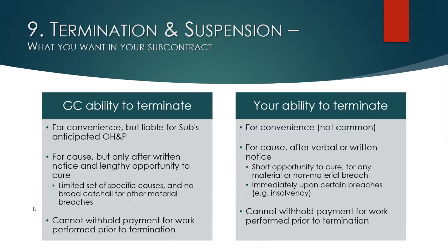Your ability to terminate for cause. If the GC or someone else is causing you detriment on the project, you would want to be able to give verbal notice of that. You don't want to be stuck with written notice, and you don't want to be required to give a long opportunity to cure.